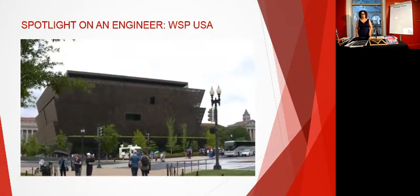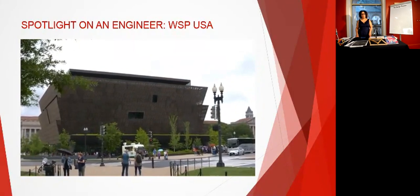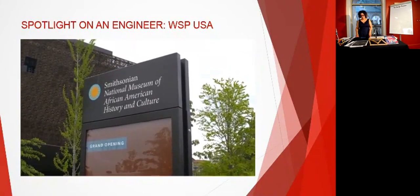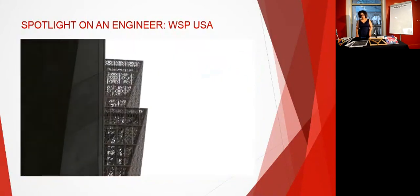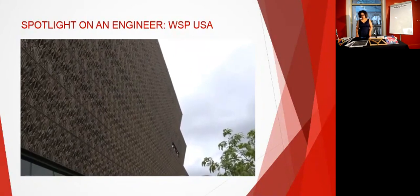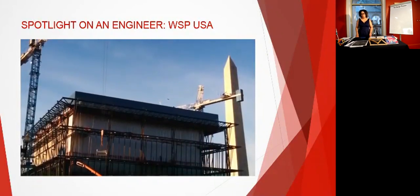So today we're at the National Museum of African American History and Culture in Washington, D.C. This is a really cool project. It won a whole bunch of awards, but the coolest thing about it is the effort and the different phases that went into this. So first thing, of course, was design. And the whole team, a lot of people, 50, 60 engineers in total probably, worked on the design for 5 years before the first shovel ever hit the ground here.